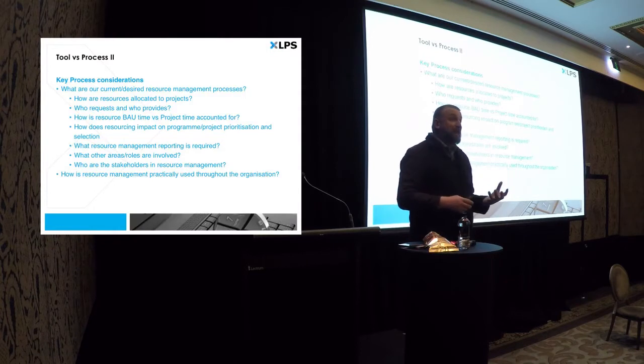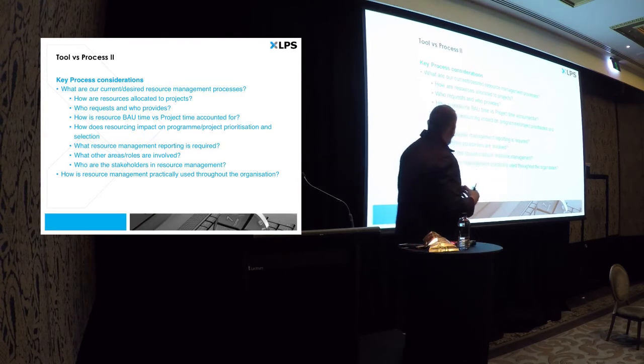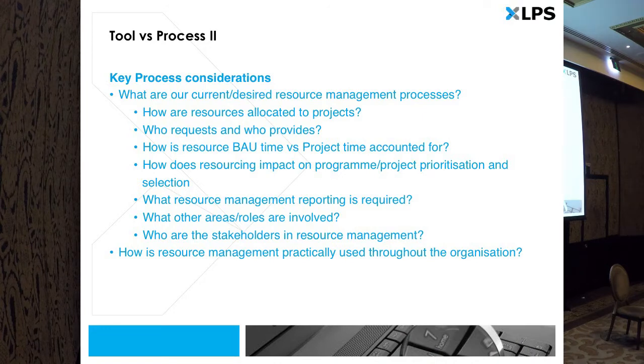How does resourcing impact on program or project prioritisation? Now, a couple of the other presentations over the last couple of days have been about project prioritisation and choosing to do the right projects and the right programs at the right times. Resource management and resource forecasting is a really important constraint we want to apply in that. So if we're using that overall project prioritisation strategic determination model or system, the resource management side is really important there. And primarily what we need to ensure is that the quality of the resource forecasting data we're using for those determinations is good.